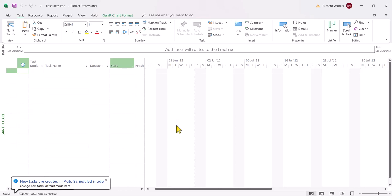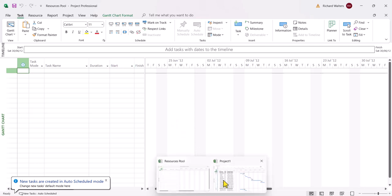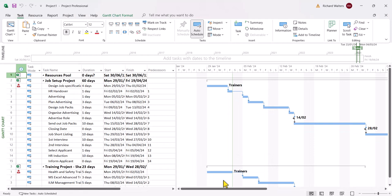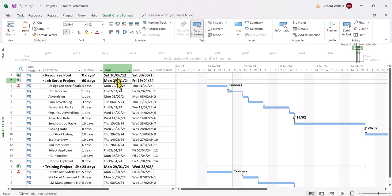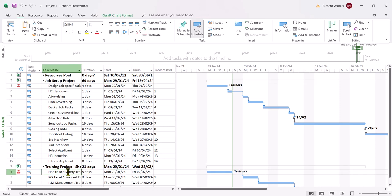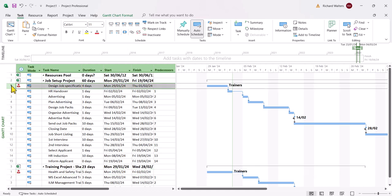Right, it's opened up the resource pool, but it's also opened up another project called Project 1 — this is the new master project we just opened. We can see there are two projects: Job Setup Project plus the Training Project. They're starting on the same date and we can see the conflict — there's red for Task 1 of the Training Project, and red for ID 1 and Task 1 of the Job Setup Project. So we're going to do an allocation split: Job Setup Project gets 20% of the Trainers, and the Training Project gets 80%, which should get rid of the red conflict.